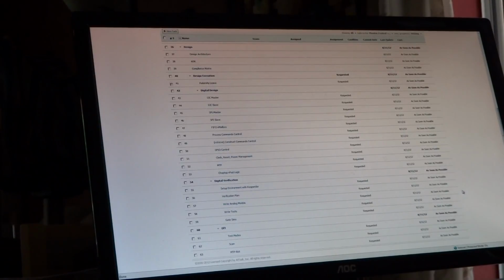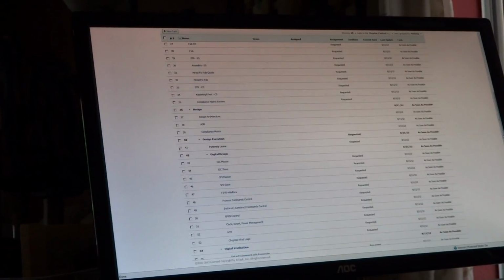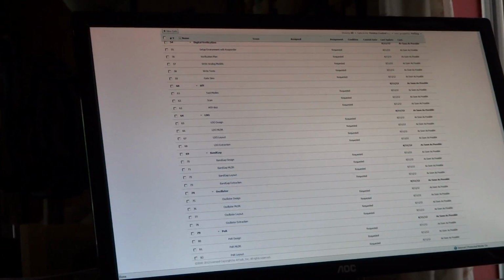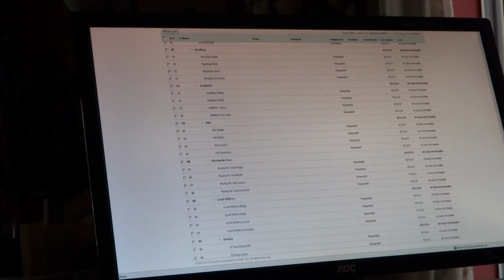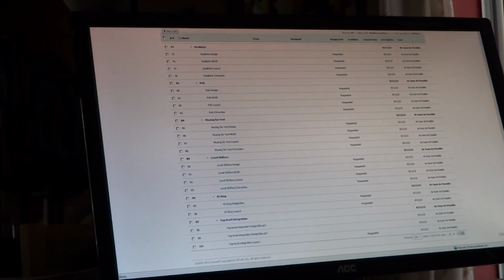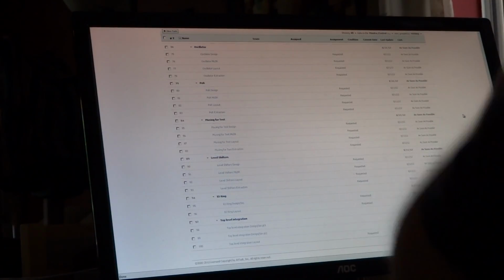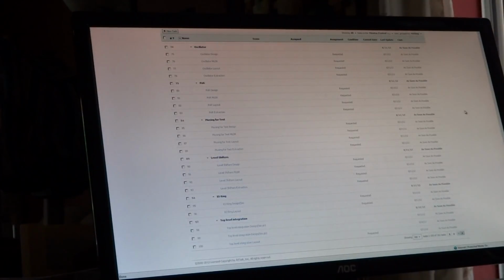I copied over a project and I want to set all of its tasks to constrained as soon as possible. I found that when I copied the project, the task that had a fixed start date prevented me from making changes to the start date and having the whole project move over. Okay.